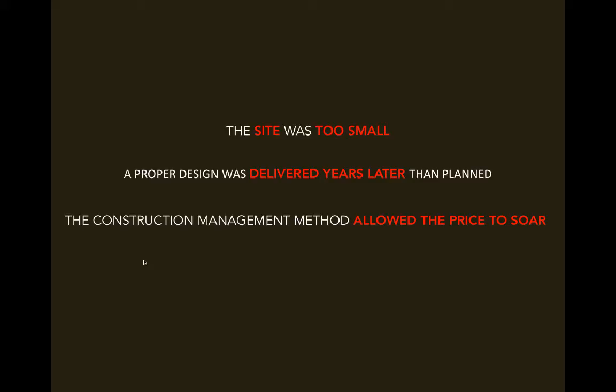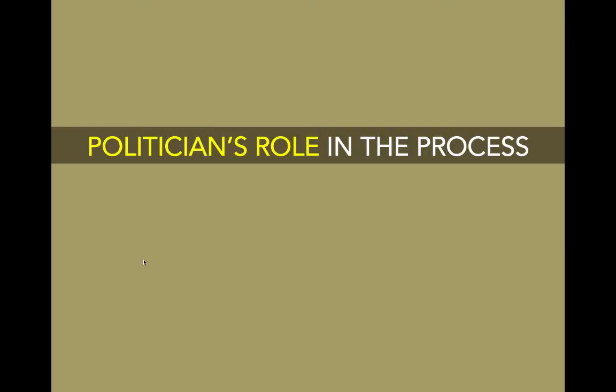The thing about construction management, I think we talked about it earlier, the CCDC 5B. Clients oftentimes, when you recommend what method they use to select, need to know what the number is before the contractor starts to scrape the ground. So that means you want to recommend a stipulated sum contract, or design-build. Construction management is a really tough one, because in that one you never know what the price is, oftentimes until it's way too late to influence it.